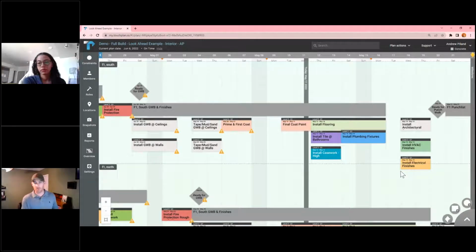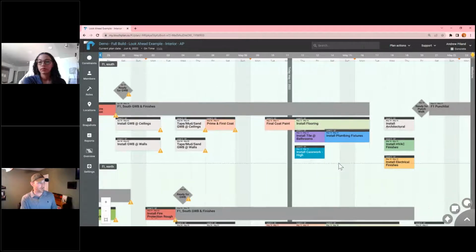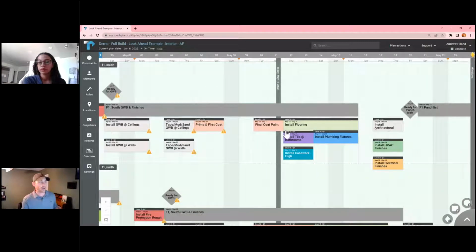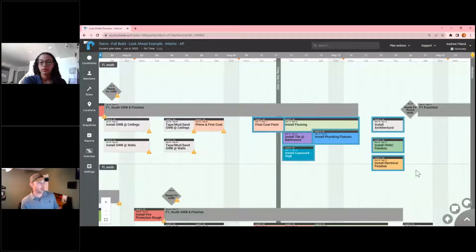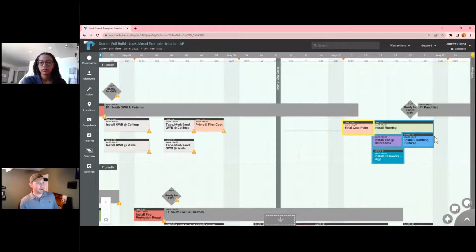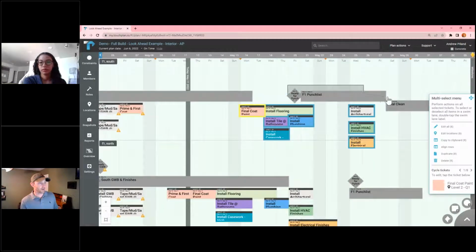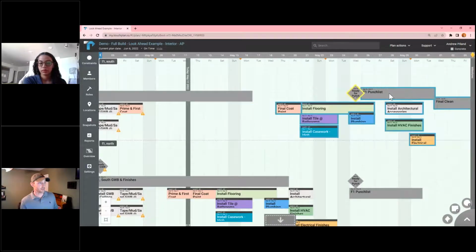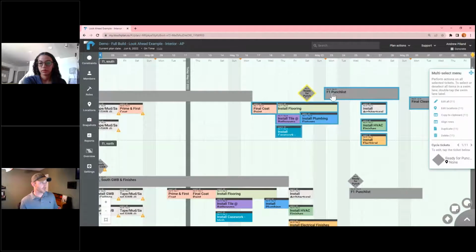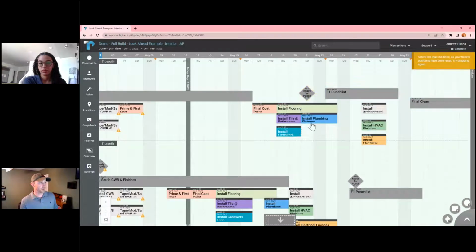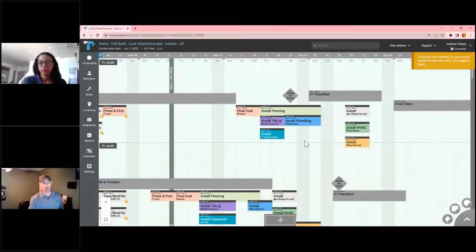And she tells me, okay, my supplier tells me I can have it by Friday. Okay, great. So that means I probably won't be able to start painting until Monday. And now I can go through and say, look, if we're serious about changing the paint color, if we want to move it to Monday or Tuesday, whatever, I'm not going to be ready for a punch walk until the next Friday.